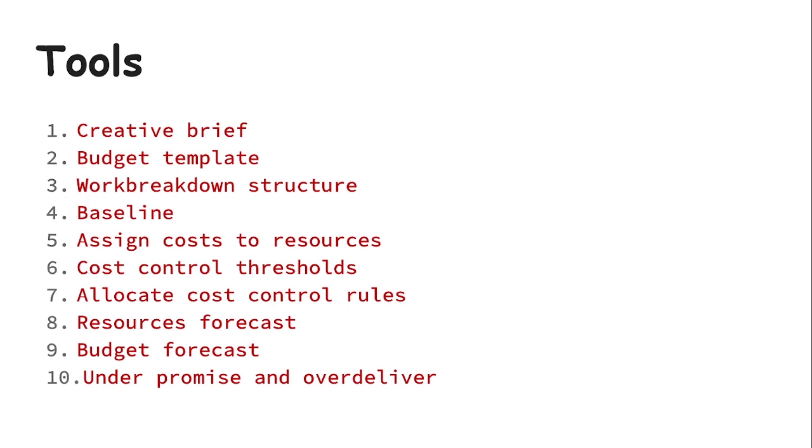Then incorporate all the spending categories in your new budget, and adjust your budget so that you can avoid variances in lines where expenses previously varied significantly from the budgeted amounts. So you make your budget template very clear, and you know these are the expenses we're going to be spending on, and this is a projected budget.